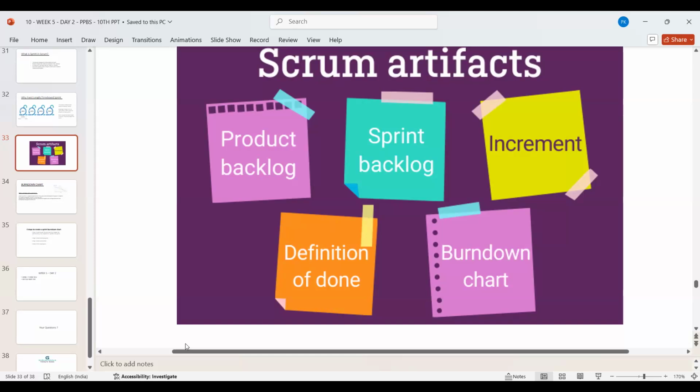In the same way, nobody would come and check your day-to-day working. But when we say definition of done, that means my code is definitely tested by my peers or my supervisor. My code has gone through all the unit testing; not only development, but testing is also thoroughly done. There are no known or unknown bugs in the system.